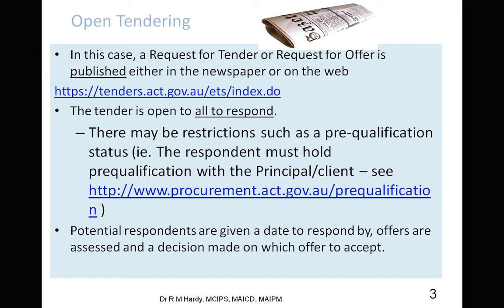Builders really rarely say that they don't want to put in a tender. They will always put in a tender. Their way of communicating to you in this kind of context in the domestic market is just to jack up their price if they don't really want to do it. So that it makes it worth their while if they actually do it. Yeah. So these are the kind of little codes, little things that happen.